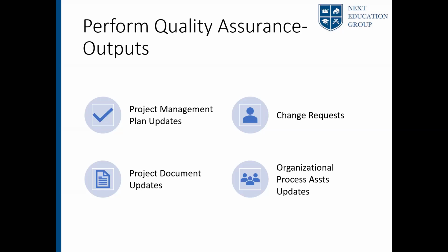But as you rightly said, Naif, a change request is something additional to the scope that is agreed. It's basically a change to the agreed scope. Whereas an audit recommendation is a fix that you are making in order to conform to the requirements that were promised. So audit looks from a conformance point of view. Change request looks from an enhancement point of view. Sometimes when you inspect, the customer would say, okay, it might be better if you have this instead of that. And then he would say, okay, what is the additional cost? I'll bear it. Let's do it that way. So those are change requests. Audit findings are to conform to the initial scope.